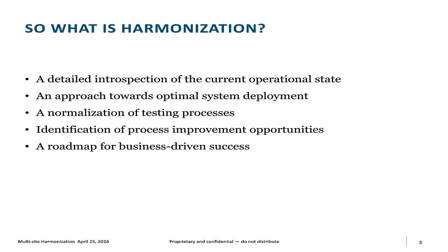That way we make sure that we properly utilize our budget for those things that bring the biggest business impact. If there's budget that becomes available over a continuum of the project, we can defer items that are not as critical to second and third phases of the project. But a roadmap for success means that we're identifying those things that bring the most benefit immediately.